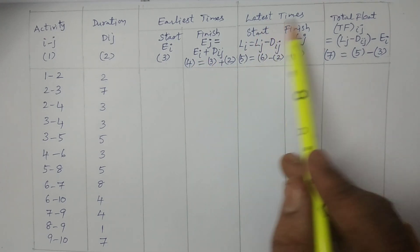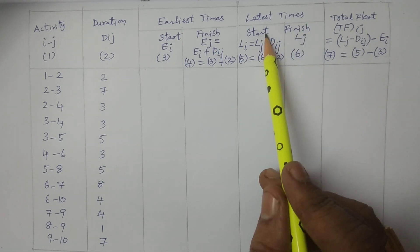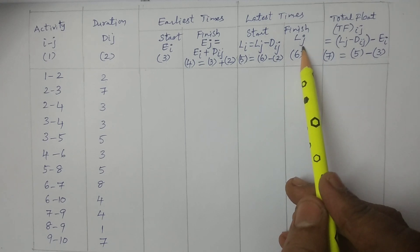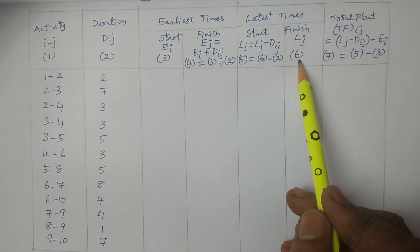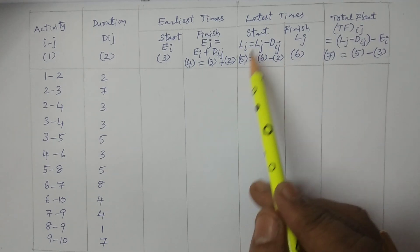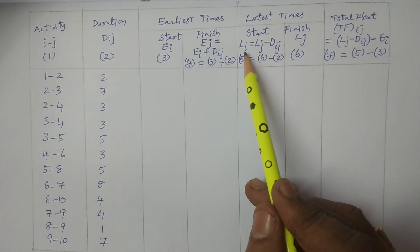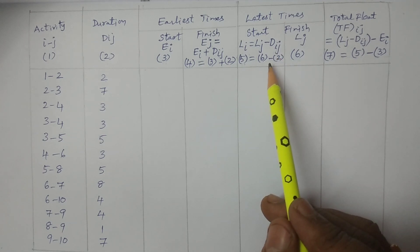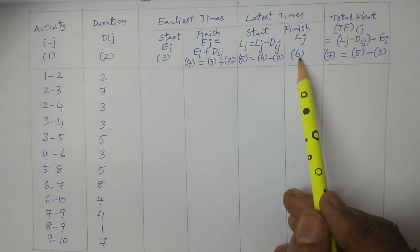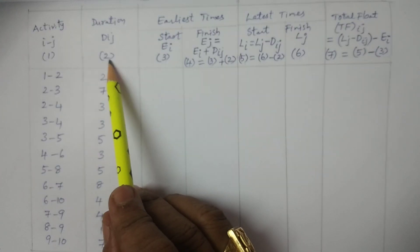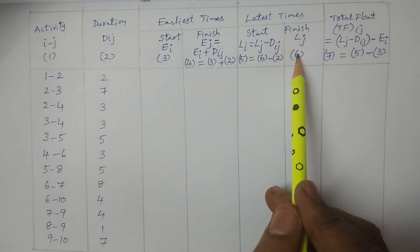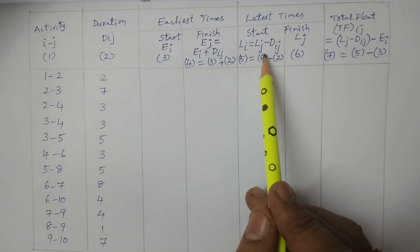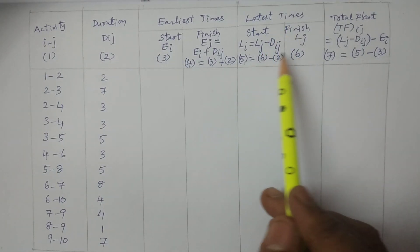For latest times: latest finish is LJ, represented in the sixth column. Latest start LS, that is LI, is equal to LJ minus DIJ — obtained by subtracting the second column from the sixth column. Sixth minus second gives the fifth column. These are the latest times.